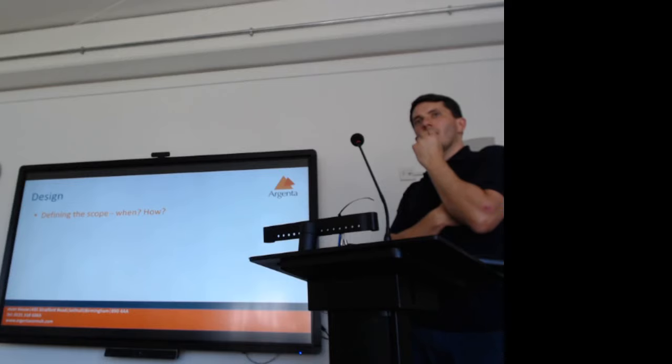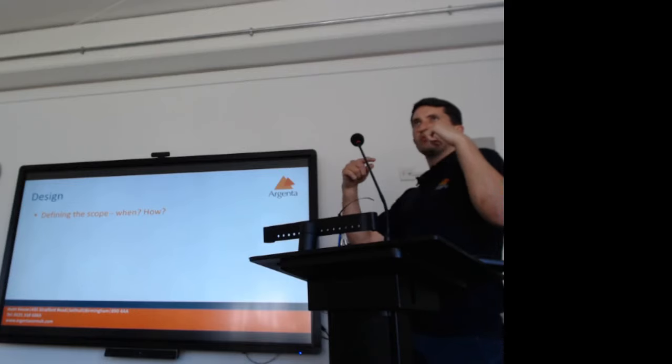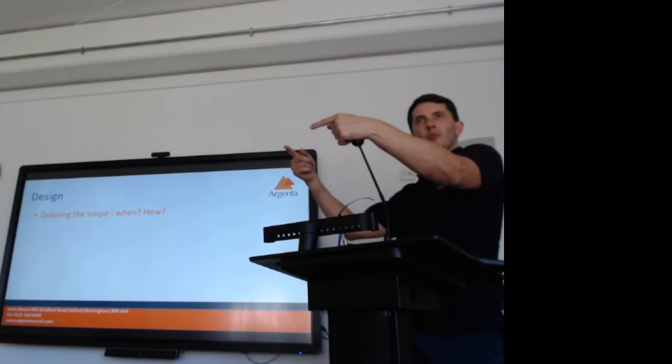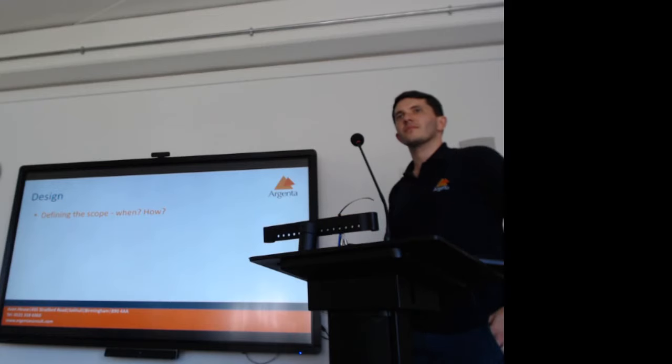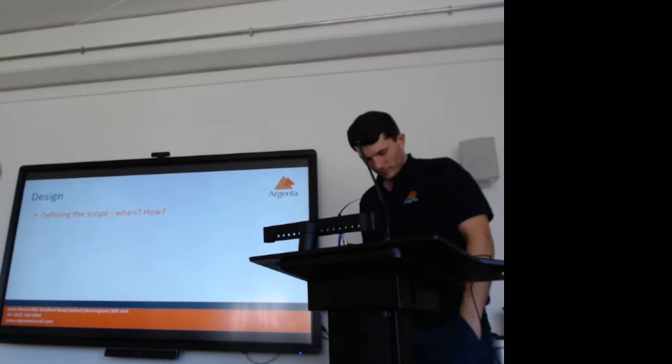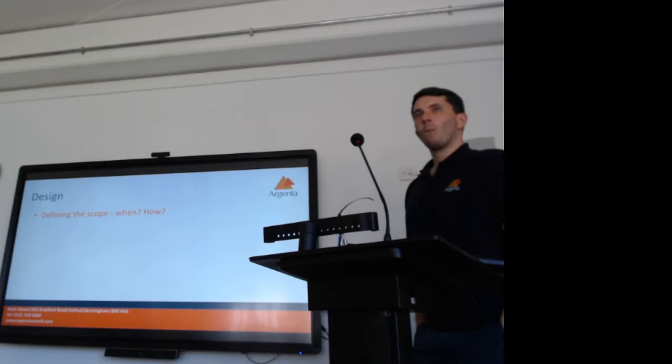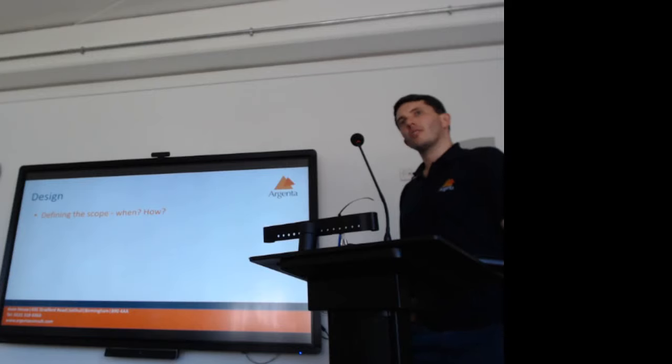And that's probably a good point to reflect on, actually, that the responsibility is almost on the customer to come up with those, or jointly. Yeah, and it helps in the testing as well. So the customer has to put themselves where you are, and then where each of their interactors are. If they come up with a story that's not in scope, you've got a pretty easy conversation. And then you can have that conversation when asked, can you put this here? You can say, well, which of the use cases is that working to?